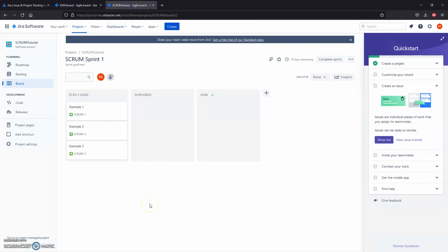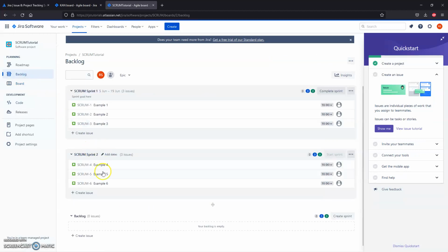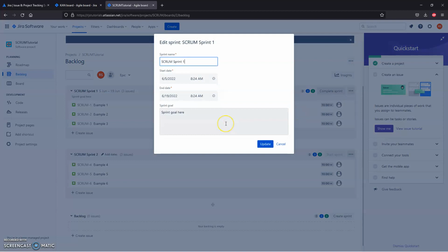Scrum functions differently from Kanban in one key way. Where Kanban works similarly to an assembly line with each person doing their task constantly until everything is done, Scrum defines a work period as a sprint. Sprints typically last anywhere from 2 to 4 weeks with a stated sprint goal. The purpose of a sprint goal is to provide guidance for the team and coherence to the product. Sprints are typically considered successes when the sprint goal has been met.